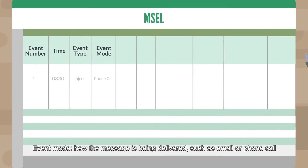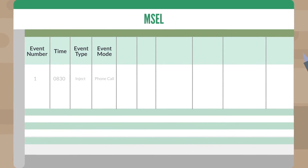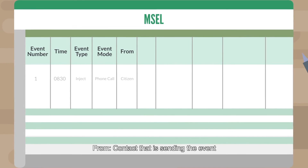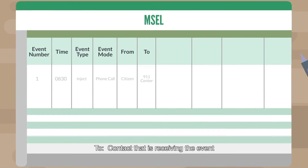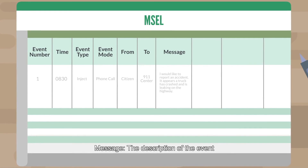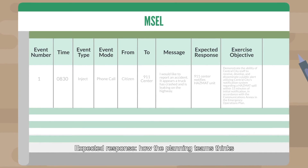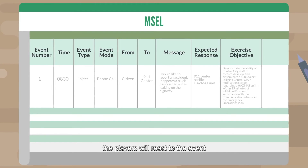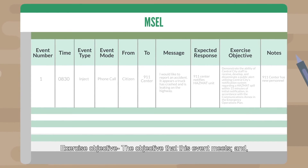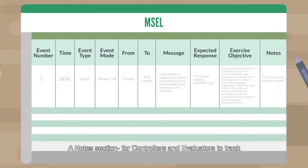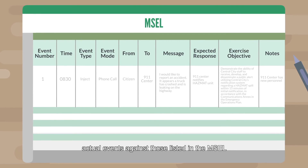Event mode: how the message is being delivered, such as email or phone call. From: the contact that is sending the event. To: the contact that is receiving the event. Message: the description of the event. Expected response: how the planning team thinks the players will react to the event. Exercise objective: the objective that this event meets. And a note section for controllers and evaluators to track actual events against those listed in the MEASL.